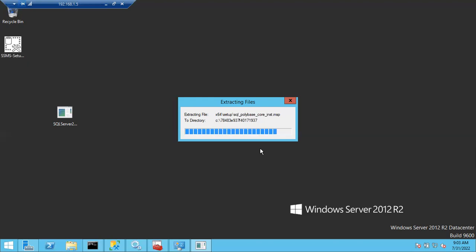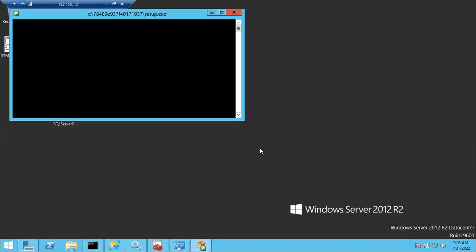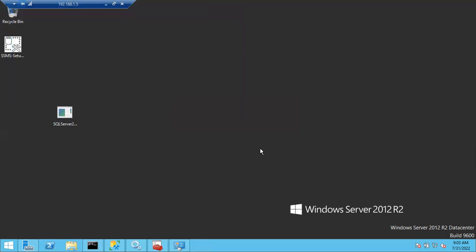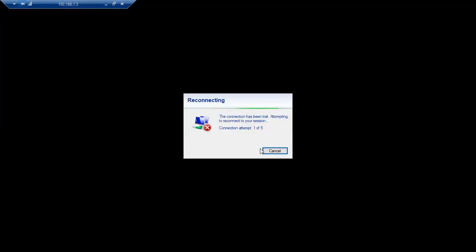As you took the downtime approval, you can restart multiple times, that 1 hour window or 2 hours window, guys. At least take a 3 hours window. Don't take a 5 to 10 minutes window. In case something goes wrong, to troubleshoot it might take at least 1 or 2 hours. Or if you need any other team's support, they don't directly come and support you, you have to wait for their support.